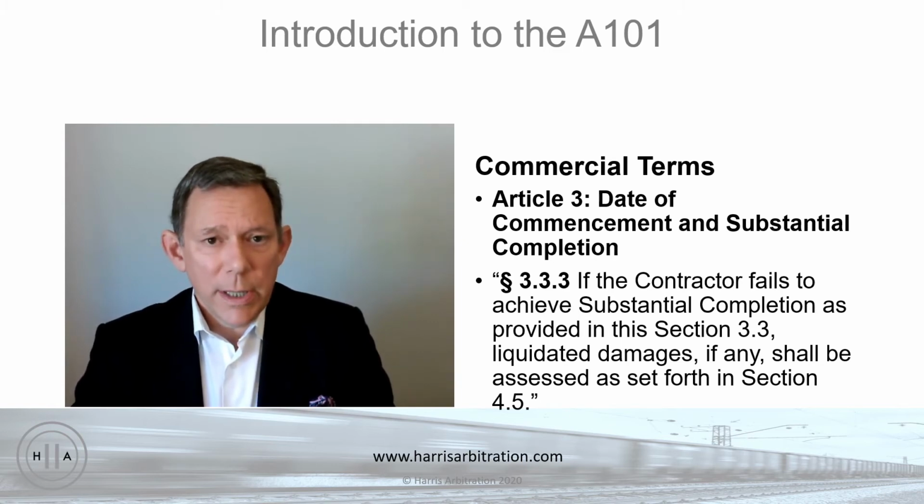And the way in legal terms we talk about that is that the owner's obligation to pay is conditioned on the contractor's complete performance. And if the contractor did not perform that condition of 100% performance, then in effect the contractor forfeited any right to payment by the owner. Well, that seemed like a pretty harsh rule, as I say.